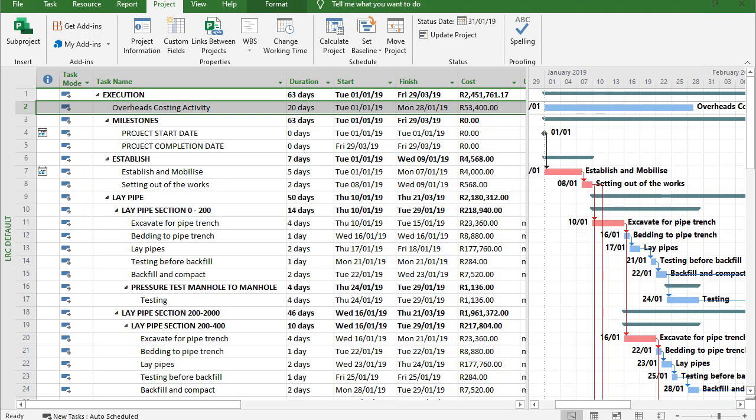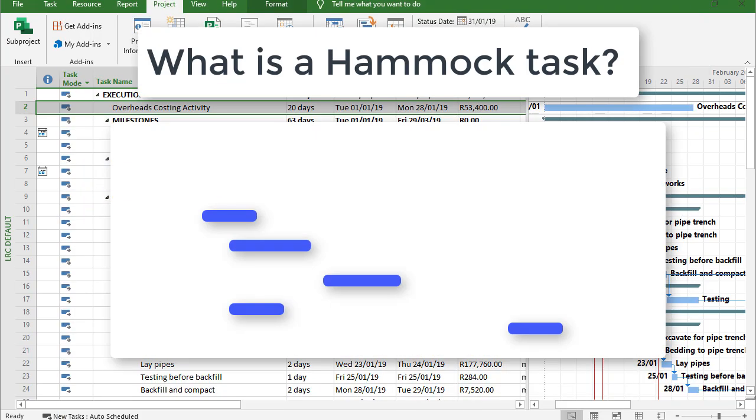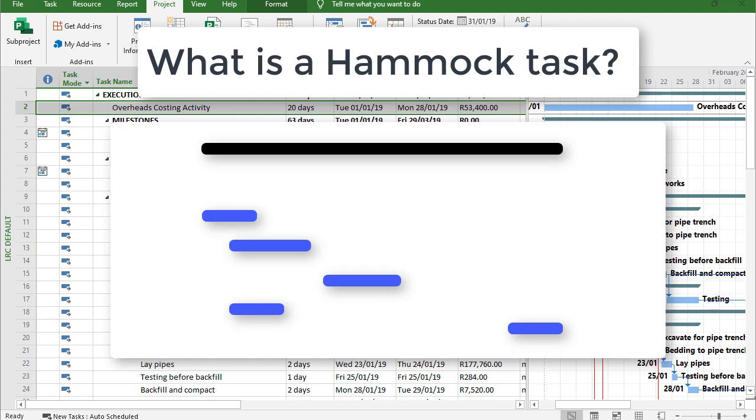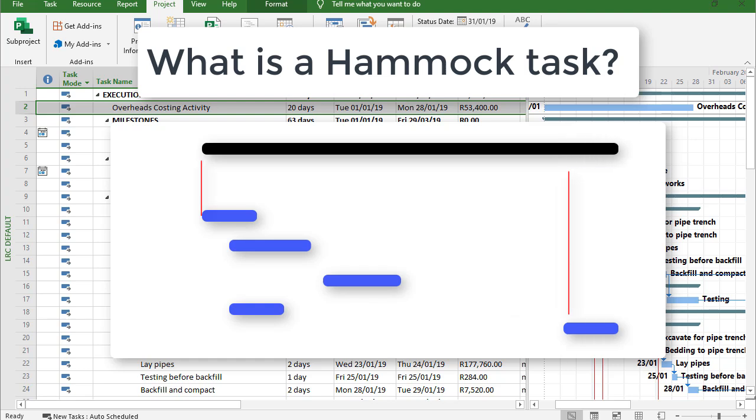So firstly, what is a hammock? It's simply an activity whereby you can group a series of unrelated tasks under one heading. And in a hammock the idea is also that you hang the hammock between two dates, so usually a start and end date, and the hammock will then expand and contract as you move those dates around.